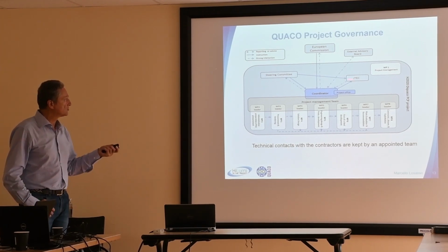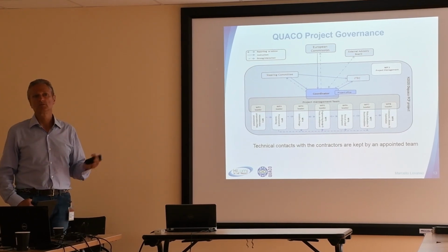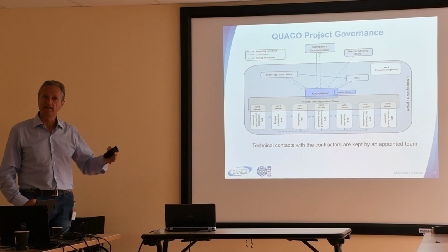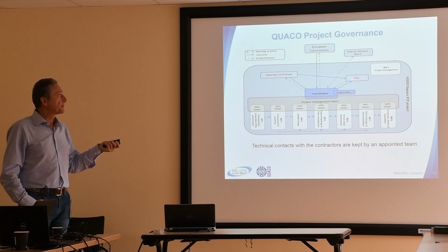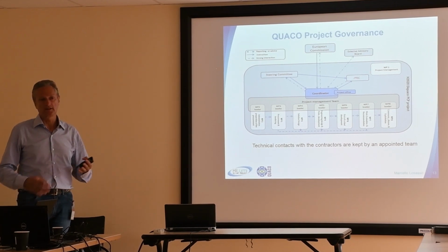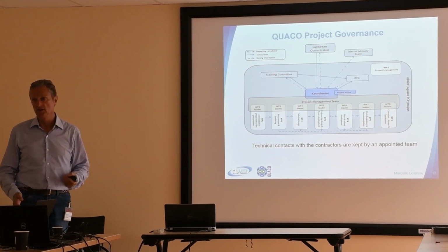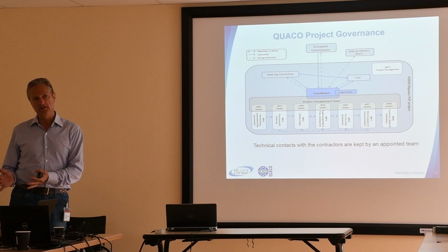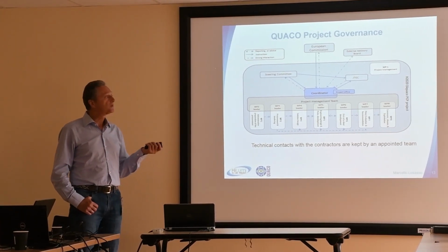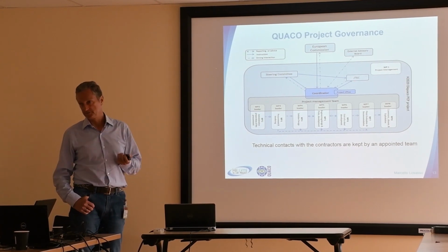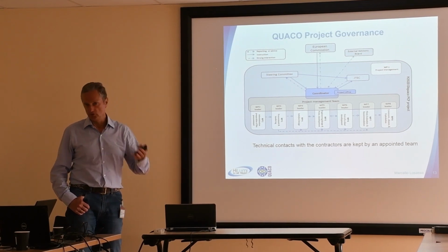So I was chairing the JTEC, but the JTEC, as I was saying, takes a decision because this is the committee that evaluates tenders and recommends to the steering committee to award the contract. So this is quite an important body, and of course you need to have representatives from all the consortium members.